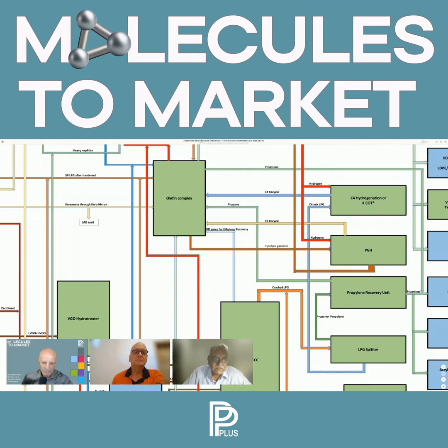That is why this arrangement in India is not popular between a private company and a public sector undertaking. Only when the contractor is also a public sector undertaking is it possible. Because a public sector undertaking comes under government audit, both the contractor's as well as the owner's finance files are reviewed by the government. Because of that, there is absolute transparency. There cannot be any malfeasance. Anyway, this is another way which affects the cost. Why I'm telling all this is because all these things affect the cost of the plant. So this is one. And the third part is BOO plants.